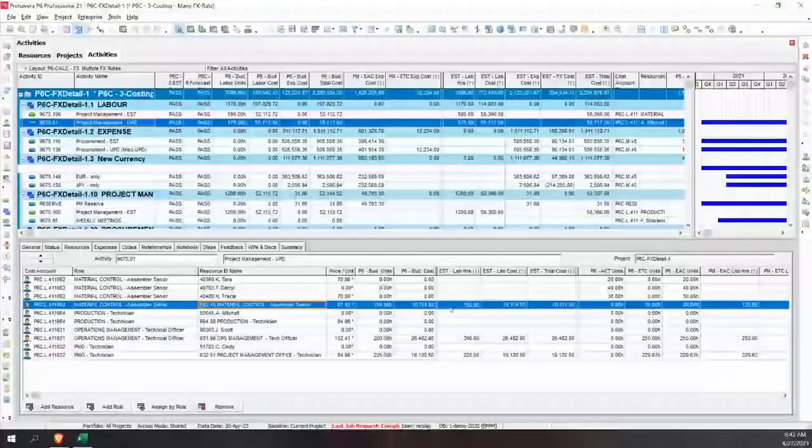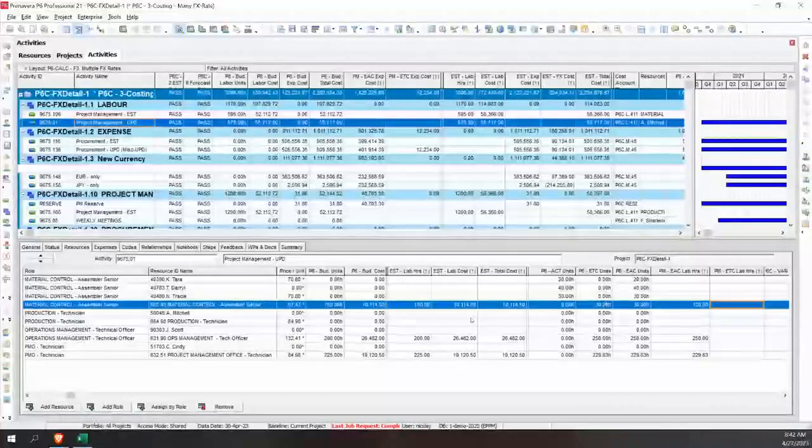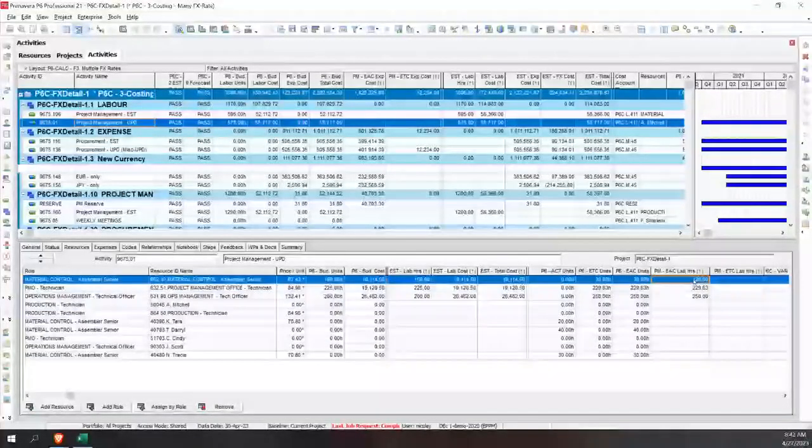So these folks, Tara, Daryl, and Tracy, all are really working against the budget that was in this role. So what you need to do is come up with a standard on how you're going to marry your budget with the actuals you're receiving. In our example here with the labor, we want our estimate at completion and our estimate to complete to be able to marry to the original estimate. These were the estimate lines, and that's where the PM has to do the forecasting. But they need to be able to see what the estimate is looking like based on the values coming from here.